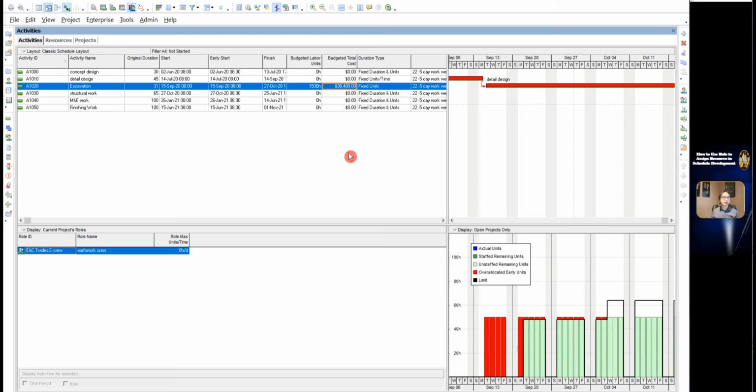Due to additional work, the budget hours is changed to 1,600. Let's change to 1,600. You can see the cost also automatically changed along with the budget unit change, meaning it is instantly recalculated along with the unit change.